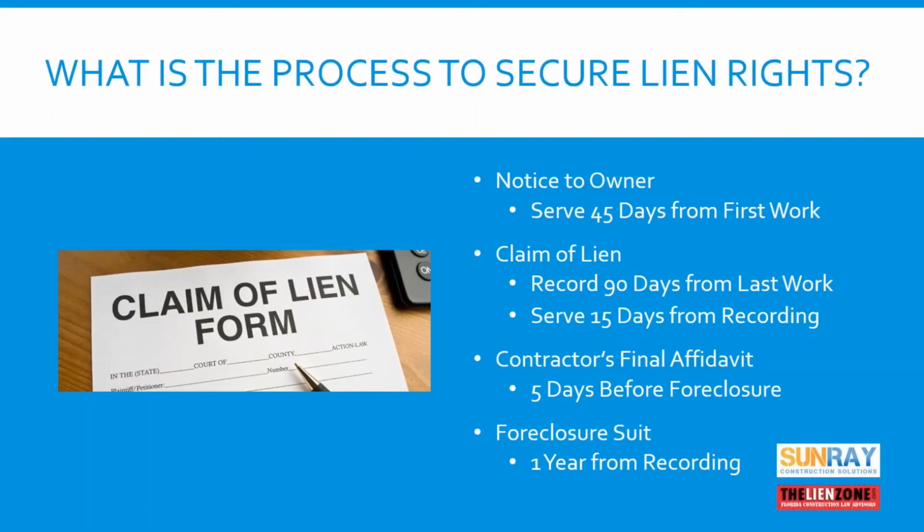This period of time can be shortened by an owner down to 60 days if they send a notice through the clerk. You'll receive that in the mail via certified mail. Or down to 20 days from the recording date if they actually file a lawsuit against you to have that period of time of the 1 year reduced down to 20 days.